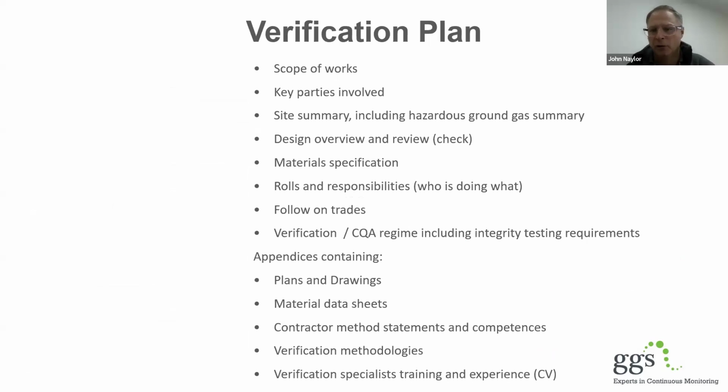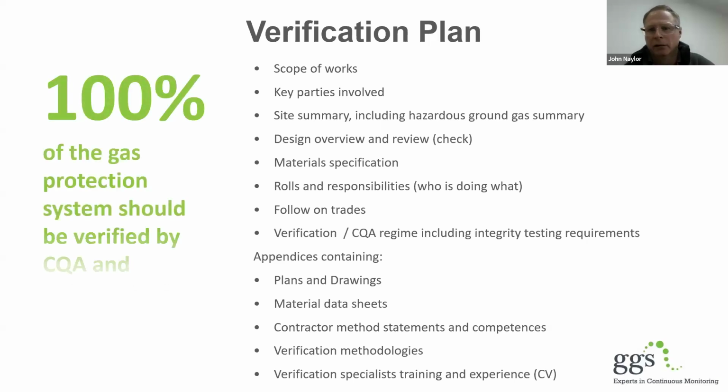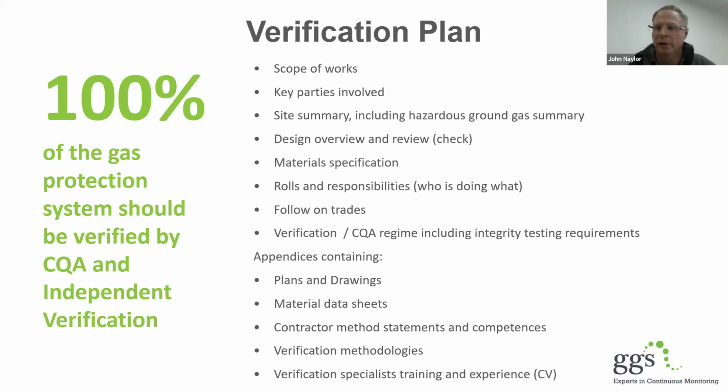If you want to know more, get Sirius 735 and have a read of that. The one thing I will try and get in people's heads is the thought of having 100% of the gas protection system verified. The only difference here is how much of it is CQA by the installing contractors and how much is done by independent verification. But if you have in your head that 100% of it needs to be done, hopefully that will all get done and not just bits here and there. There has to be an expectation that everything is looked at.